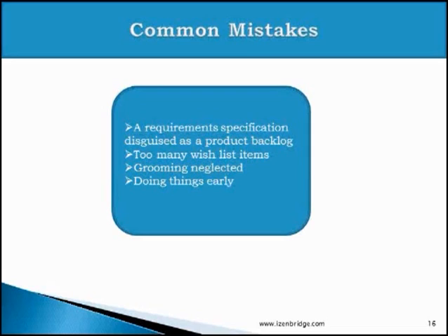We do say that the product backlog is a prioritized list of all desired features, but the features which are of low priority do not necessarily need to be ordered. They can remain at the bottom, and we should not be putting too much energy into prioritizing them at the bottom.